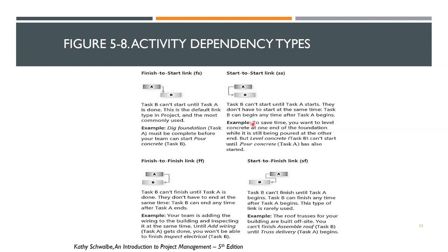Another example is any manufacturing line. Like we have to make any part in the manufacturing line. So one process is done, and until then another process can't be started. Yes, you can say that. It depends. If it is the food industry, it's a continuous flow. But you're right, if it is batch making, if you're in an auto company and you make one part and you are going to do tooling on a lathe machine, and then it's completed, then only you can go into the next station, right? Yes, sir. So that is an example of finish to start. The other person cannot start their work until you finish, right?